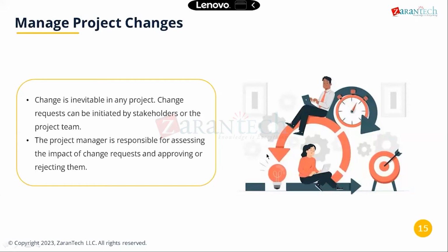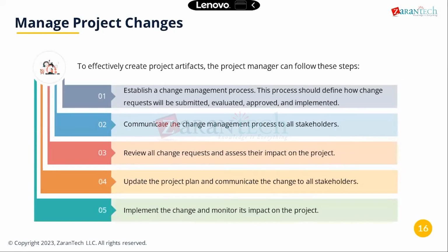Therefore, it depends on whether you're able to deploy within the given time, or you are taking additional time for implementing this additional change in the requirement. But time to market is critical. Therefore, within 1 week, we should deploy the product to the customer. If there is any major change, you should not take it now. After deployment, you'll take it to the next version of the project. That decision is taken by the senior management or the client who sponsors it. That approval or rejection decision is taken for every change. And then if it is able to be implemented now, you're updating the documentation and communicating to all the stakeholders. All these are part of proposed changes.